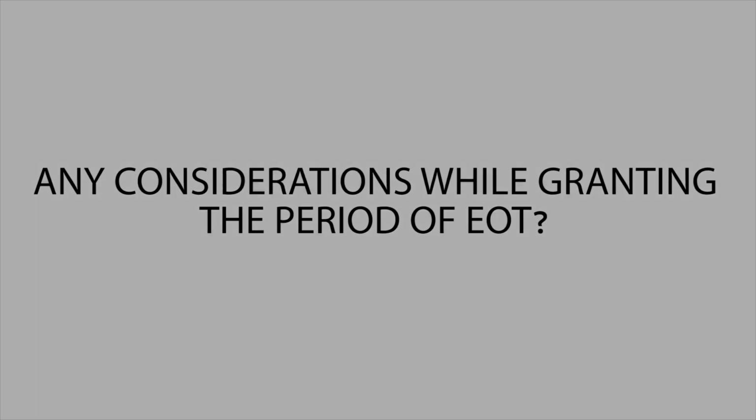When the Prime Minister announced that we would shift from MCO to CMCO on the 4th May, the contractor can no longer claim for an extension of time. They could only claim from 18th March 2020 up until 3rd May 2020, which is equivalent to 47 days.